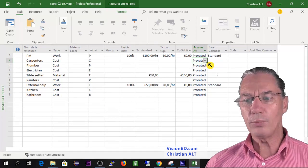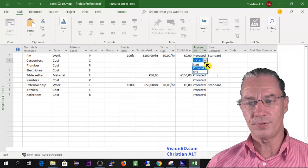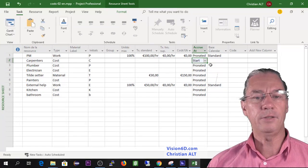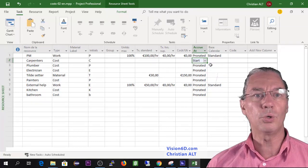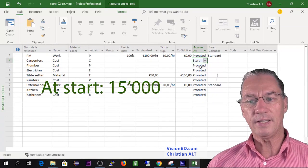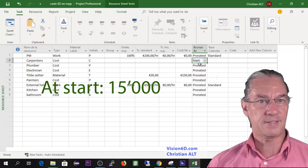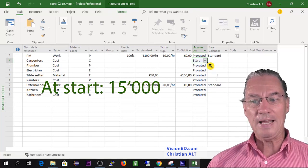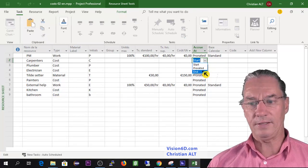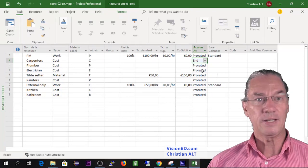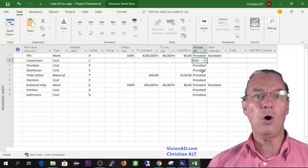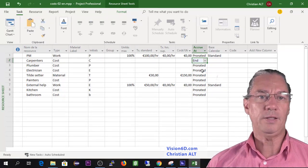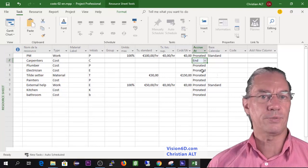If they would say, the carpenters, we want to be paid at the beginning before starting to do the work, we want to be paid the 15,000, then we would have to set this as start. And of course you guessed that the third possibility is the carpenters say, we just want to be paid at the end, the 15,000.